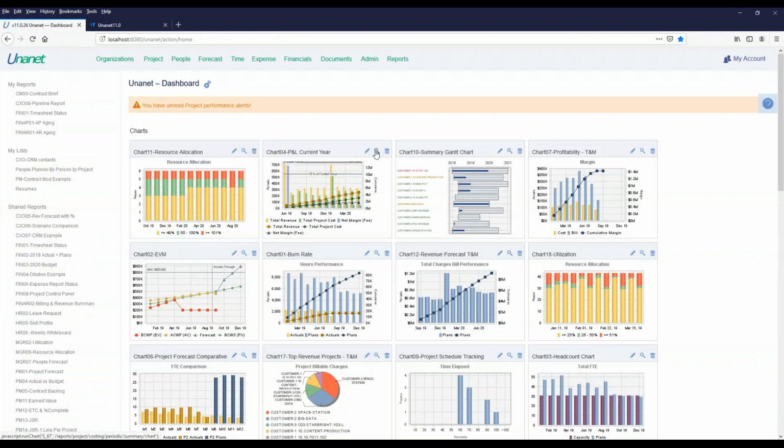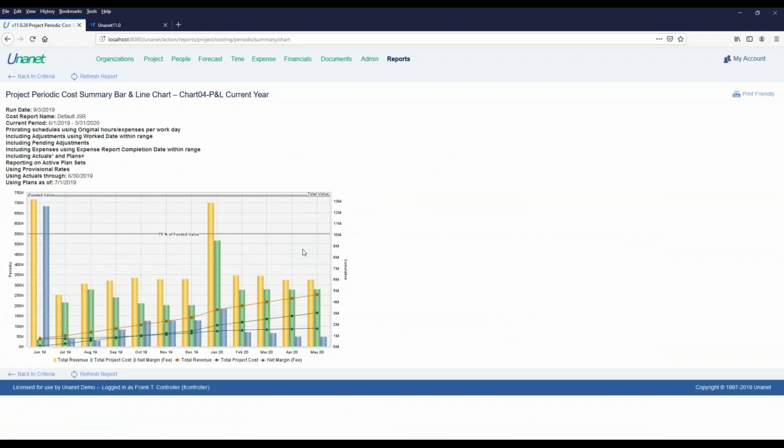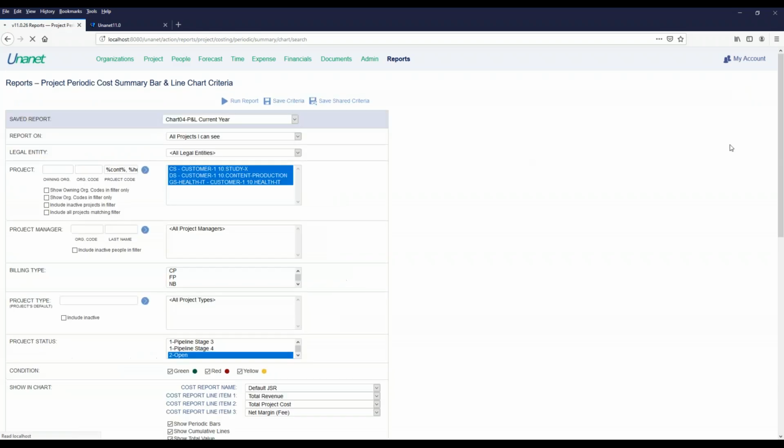And this is one that a lot of our government contractor folks like, because in this graphical version of the cost summary and status reporting mechanism, I have the ability to show funded value lines. Right now we can see up here that our total value and funded value on this particular project happen to coincide. In a lot of cases that total funded value might be somewhere below the total contract value, but I'm also able to have the chart back in here in the criteria.